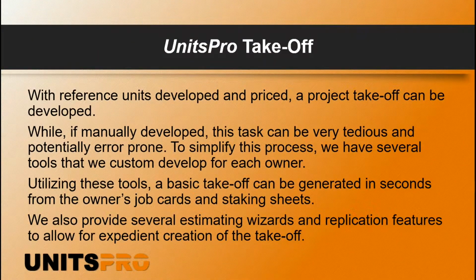So once we've gone through the task of developing all the billable units and their constituent composite or assembly units, we're ready to do a takeoff. We go ahead and take the owner's documents and we enter them into UnitsPro. Now, this can be extremely tedious and it can be very error prone. We're taking the design from the owner or engineer and we're going to replicate it. Don't like that a lot.